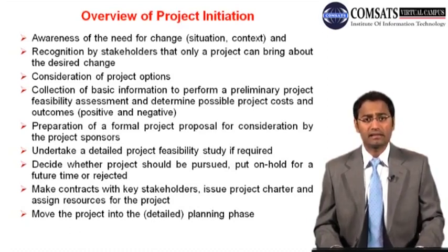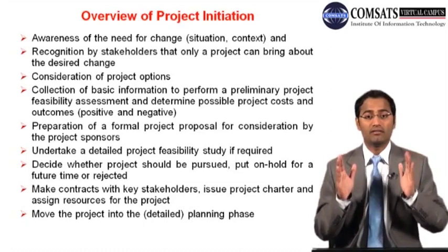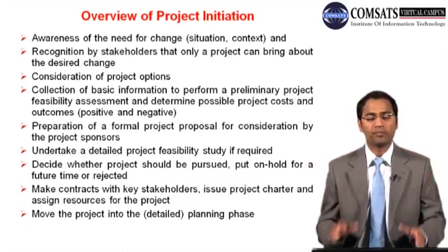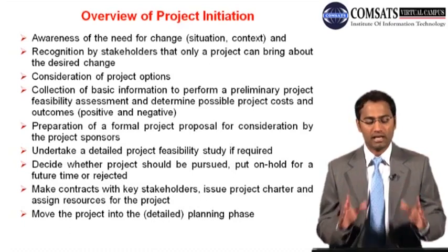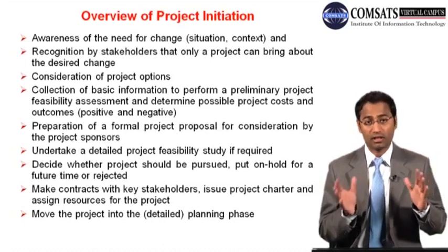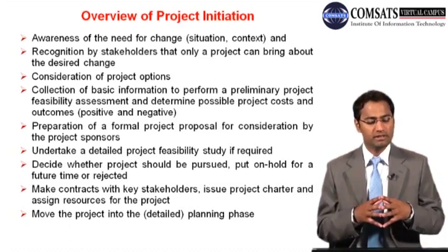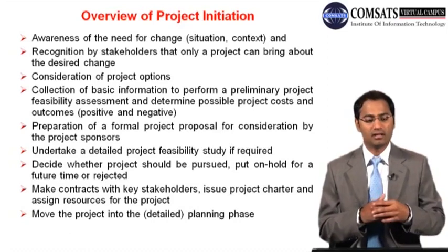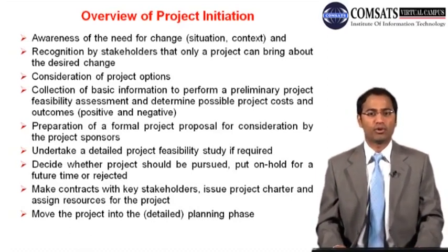Then the business case is studied, and you study the organization you are working for, and the enterprise environmental factors. Then we divide a large project into phases, and we document initial risks, requirements, assumptions, and stuff like that. Initial constraints are documented, project and product feasibility is done, and then we have contracts with key stakeholders, and at the end we develop a project charter.